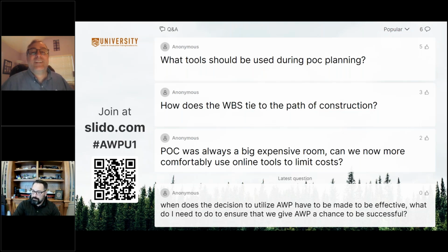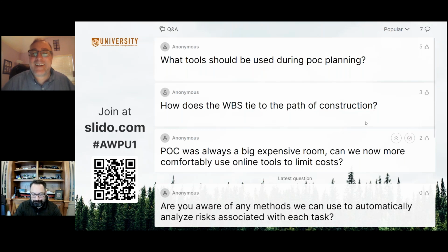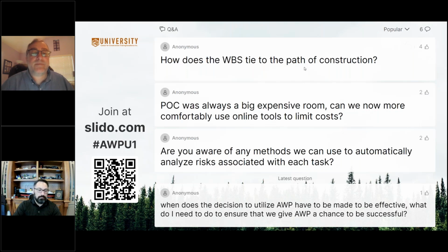There's a variety of different tools that can help along those lines. But to the extent that you can do it digitally is the trick, right? So rather than manual sticky notes that have to be translated, and then try to do something from there, start off with an electronic tool. There's a variety of different tools that can be used together, a V planner and a 4D type of tool, a V planner and a WorkPacks type of tool. The point is to go through the exercise, and the more that you can take digital technology to do that, the more that you can capture in that and reuse and refine. So I would say it's important to have some level of the infrastructure in place.